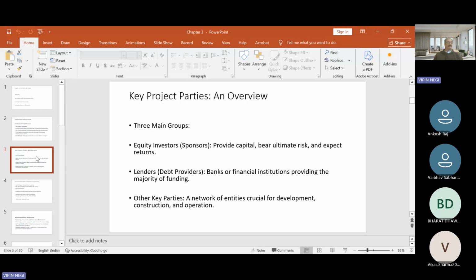And on commissioning, it monitors the performance and operations of the project until all debts are repaid. So basically, bankers have a claim on project assets and do not normally interfere in the day-to-day operations of the SPV. However, under conditions of default, these project lenders enforce their rights, which are triggered under the covenants of events of default, right? So this is about the project lenders.